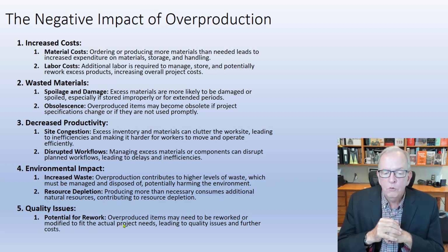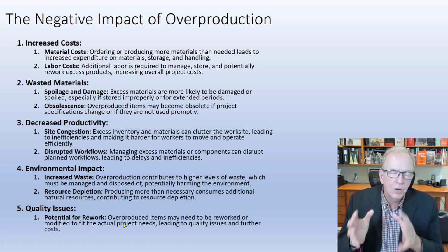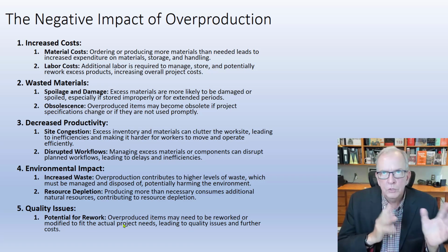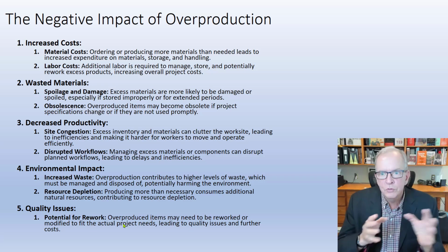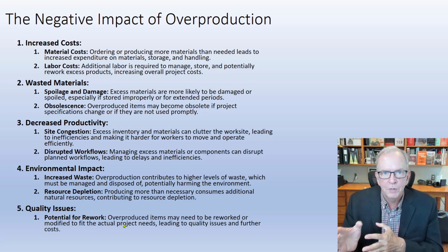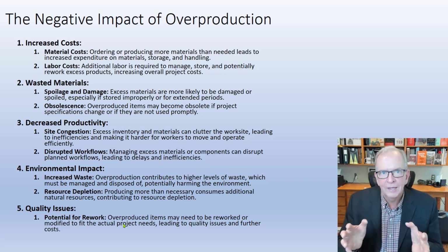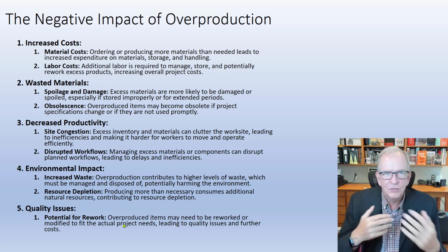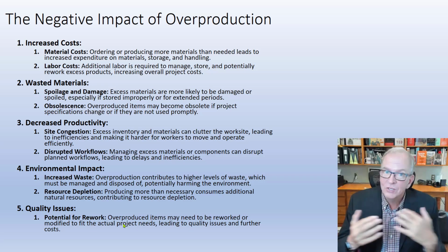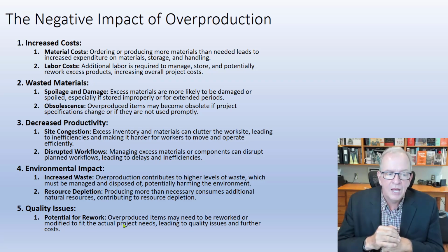If you overproduce things, and then there's a change in the actual project, sure, if it's well documented, and you've already produced it, and that was part of what you were supposed to do by the contract, you can probably get that extra cost back, probably. But it's always a pushback and adversarial, and there's time wasted in that, and there's cost wasted in that, and you've got unhappy clients and consultants as a result of that.